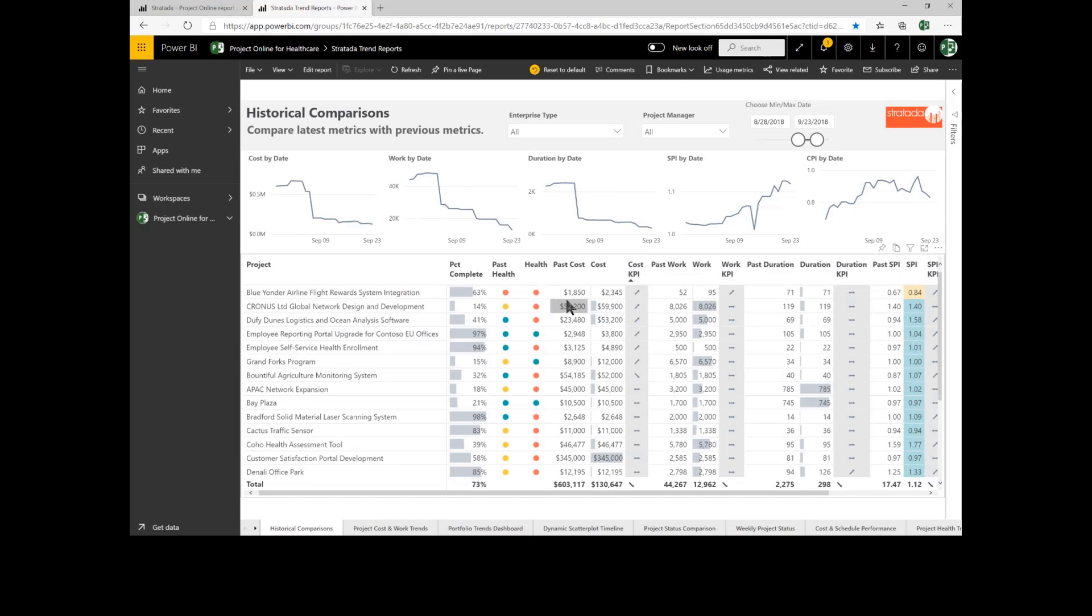I can compare past costs and current costs. I can see that the last time I measured this, the cost was $1,850 and it's gone up to $2,300. I can see my cost on this project has gone up over time. I can only do this by comparing snapshots of our projects.